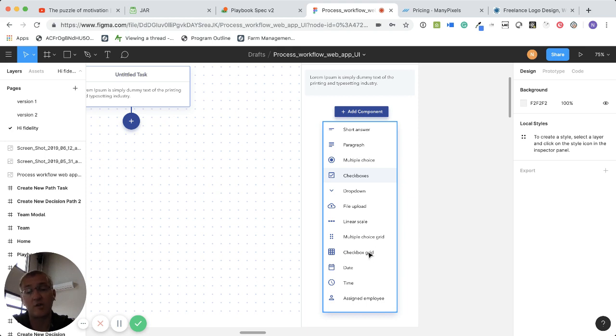And we are going to use Upwork to do that because with Manypixels we'd have to wait a day or two for each one of these. And so you'd be looking at, realistically, probably a month to just design what should be simple components. We need to be able to turn those around in a more timely fashion.